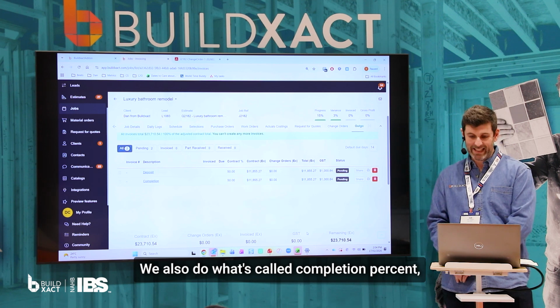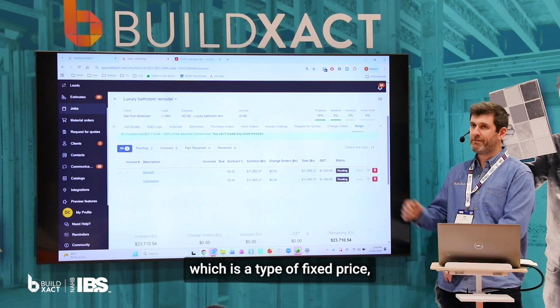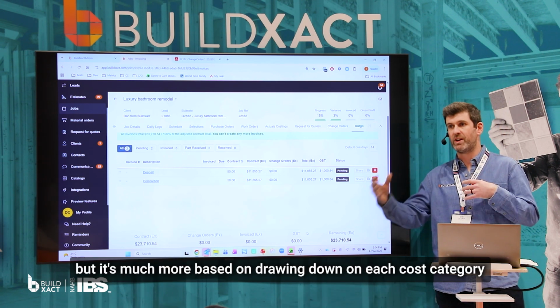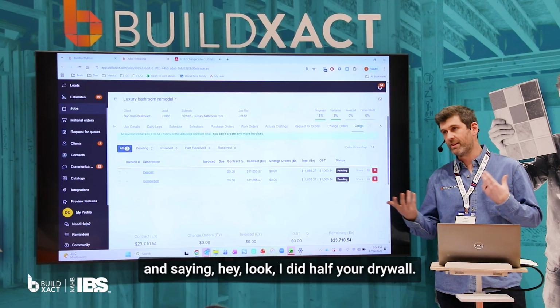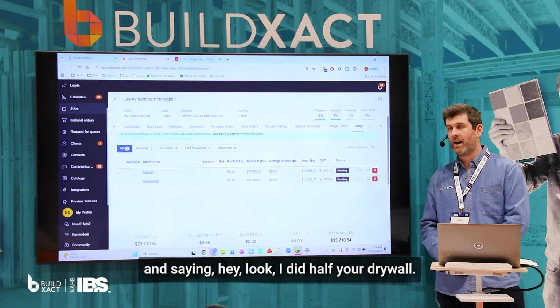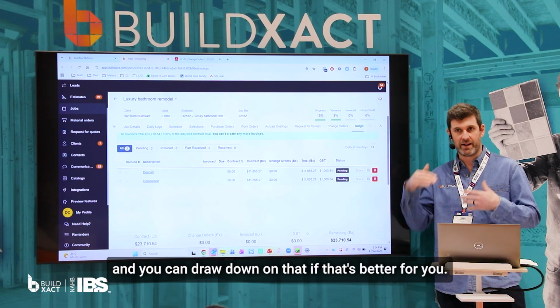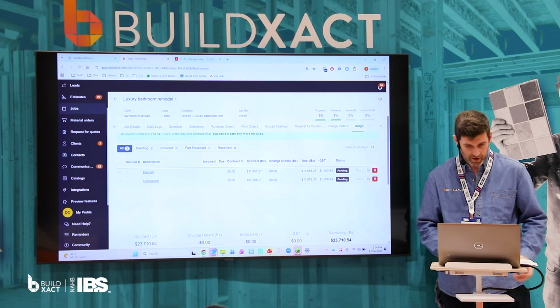We also do what's called completion percent, which is a type of fixed price, but it's much more based on drawing down on each cost category and saying, hey, look, I did half your drywall, half the floors down, and you can draw down on that if that's better for you.